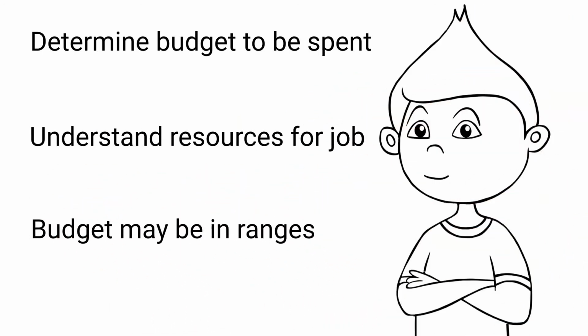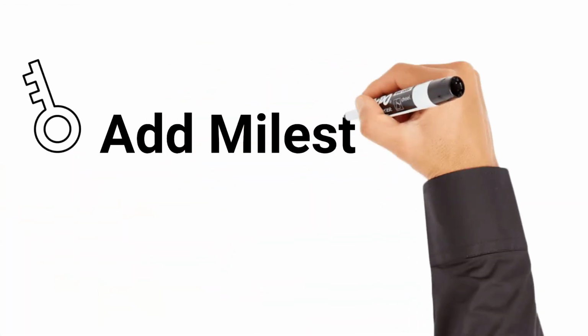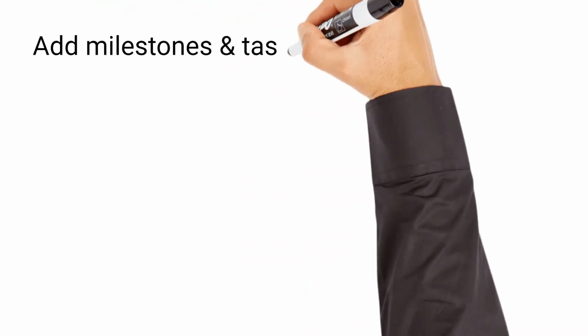The sixth one is to add milestones to your project. Use your list of deliverables as a framework for adding milestones and tasks that will need to be completed to accomplish the larger goal. Establish reasonable deadlines, taking into account project team members' productivity, availability, and efficiency.